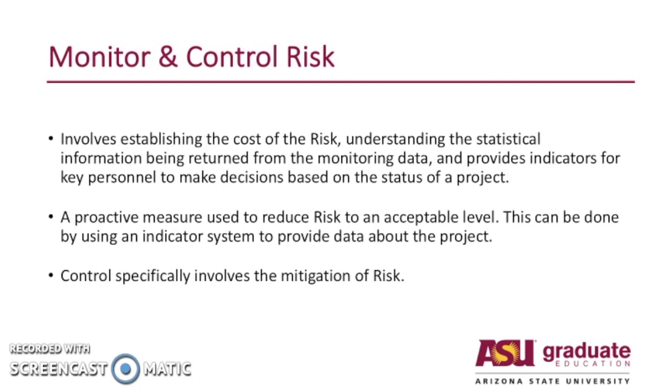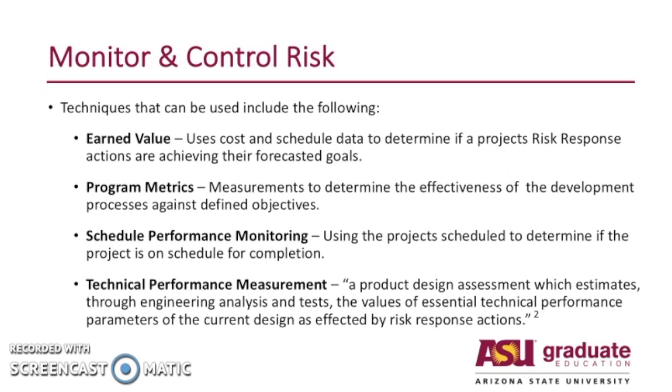A lot of times those controls specifically involve techniques such as looking at earned value of the project, so that you're looking at the cost and the schedule data to determine the project's risk response actions, and see whether or not those risk response actions are actually achieving the forecasted goals, right? You also want to ensure that you're looking at program metrics, and those are the measurements to determine the effectiveness of the development of the processes against their defined objectives.